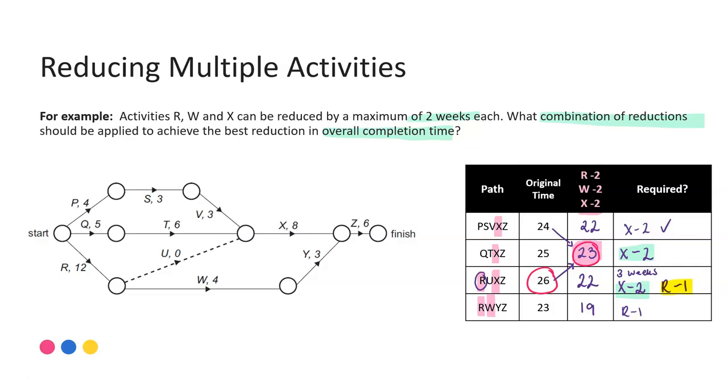So then to wrap up and give my final answer, once I've done all this working off to the side, what combination of reduction should be applied to achieve the best reduction in the overall completion time? I should reduce activity X by two weeks and R by one week. So that gives us that overall saving of three weeks and we haven't wasted any. We haven't done any additional reductions that weren't necessarily required.